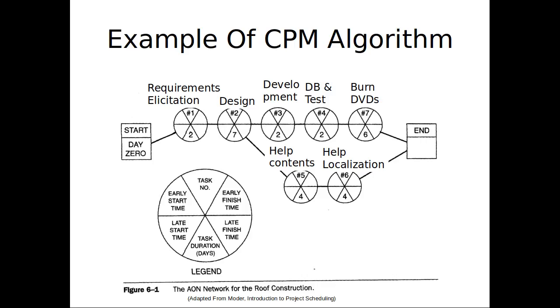So now for this downwards component, when's the earliest that 5 can start? 9. It depends on 2. I should make these all directed arrows to make this very explicit. So it depends on 2. And 2 doesn't finish until time 9 at the earliest. So the earliest it can possibly start is 9. And then it runs till when?